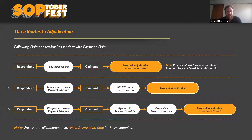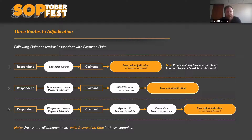As a starting point, there are three main roads that can take us down the path to adjudication. The first: a claim is made, the respondent fails to pay on time, and the claimant can look at adjudication or seek summary judgment. In that circumstance, the respondent may have a second chance to serve a payment schedule.